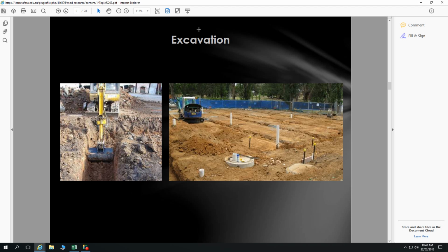With really clay soils, you can get fairly messy scenarios like this because your clay breaks away in clumps, particularly if it's dry. It just cracks away in clumps and so on. And excavating in April, May might be a good idea to avoid that sort of thing, but it's not always possible. So it is soil dependent, but it's also site preparation dependent as well.